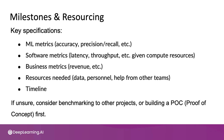Or consider building a proof of concept first in order to get a better sense of what accuracy, precision, latency, throughput, or other metrics might be feasible. Only after you've done that POC — proof of concept — use that information to more confidently scope out the milestones and resources needed for a larger scale execution of the project.